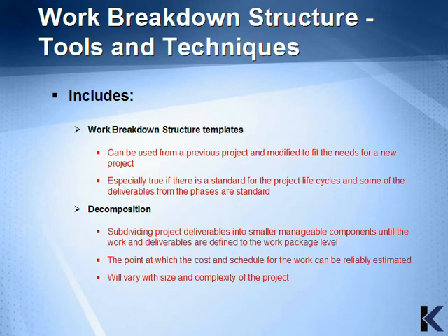In decomposition, you're subdividing project deliverables into smaller, manageable components until the work and deliverables are defined to the work package level, the point at which the cost and schedule for the work can be reliably estimated. This will vary with the size and complexity of the project.